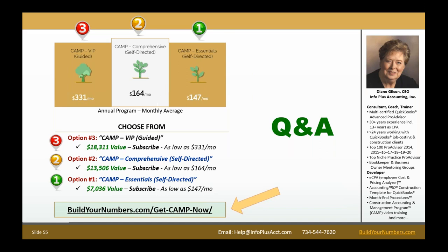And by putting a tracking system in place, if you've got employees on the payroll side, it can make a huge difference. Those are some pretty big dollars that start flowing through on the employee side. So that's one really large area that you can hone in on and start using your results, tweaking and getting better at estimating the amount of time it takes to do certain things, and then holding people accountable for hitting those.